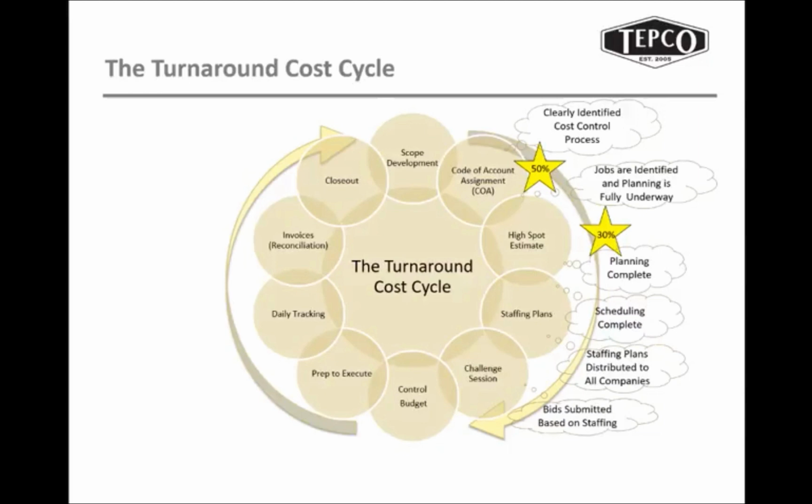They may walk the jobs and look at the jobs with work packages, but there's a session here that's called a challenge session. So the bids are submitted, the packages are reviewed, and there's an agreement made on how many people they're going to bring on site to perform the work, or how much it's going to take. Now, these bids are broken down into specific code of accounts, and I'm going to discuss that a little bit more, but just know that the bids are pretty standard when they bid that job.